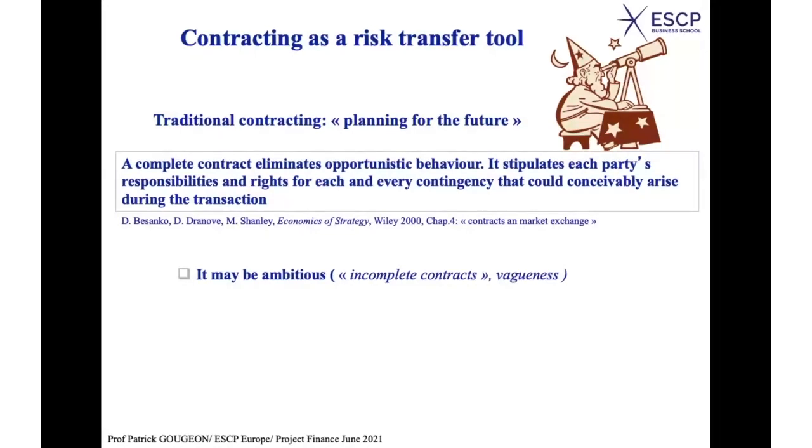Because there was an engine, and the client said that the power was not like it should be as stipulated in the contract. The problem is that the way the measure of the power should be done, as stipulated in the contract, was so vague that they couldn't agree on how to measure it. Okay, that's an example of vagueness which took 10 years to be solved with very expensive lawyers.